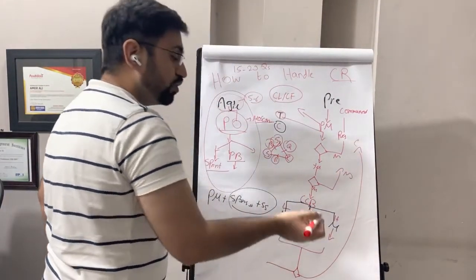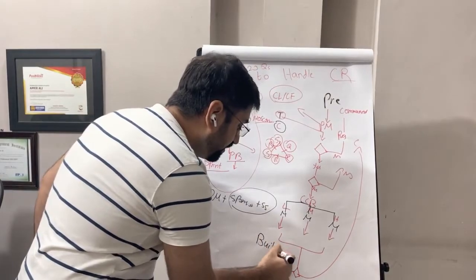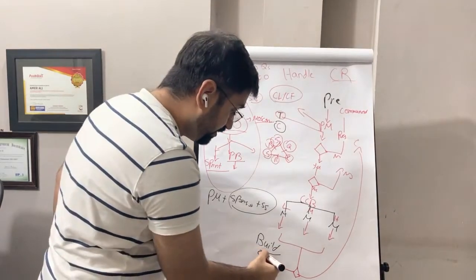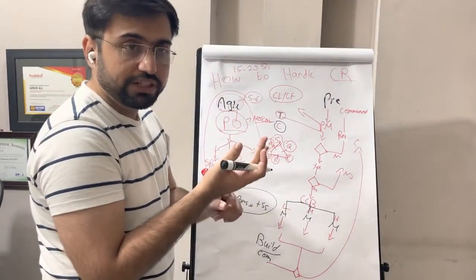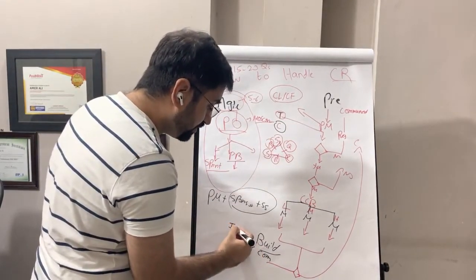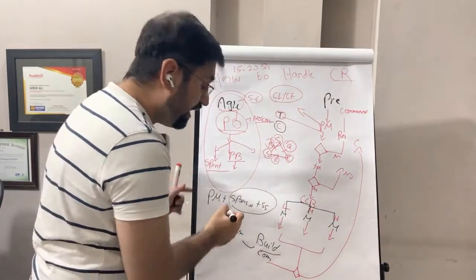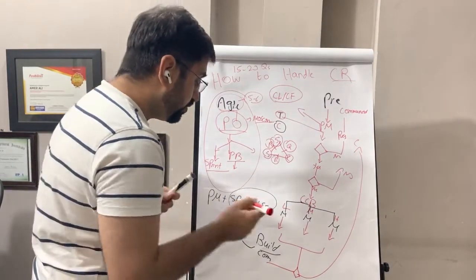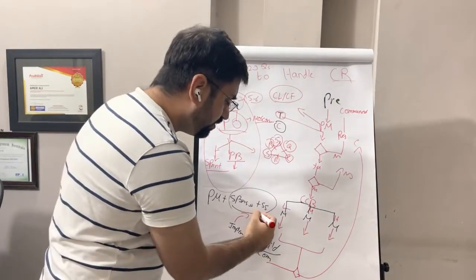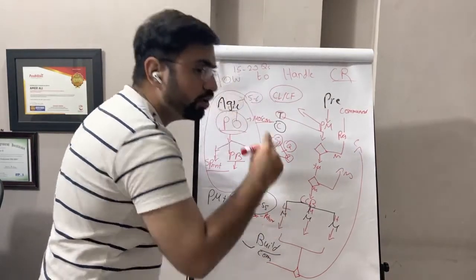So if the change is approved, then you build the change. That means you plan how this change will go, update the change log, and communicate. You update the change log, build the change, communicate the change to all the relevant parties, then you implement the change. Execution of that change: you implement the actual change, and once the change is implemented, you communicate to all the stakeholders, hey, this has been implemented, and you rebalance, again communicate and rebalance, and you keep on doing the same process.